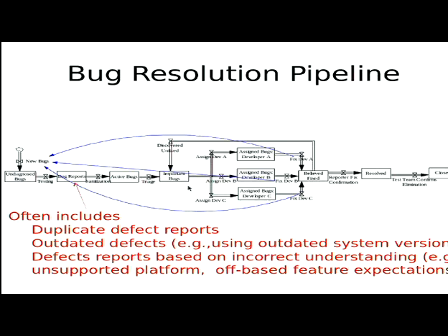So this triage process, which often involves discovering how many actually are in this active bugs area, and then going through and rating them according to standards we'll be talking about in a bit, is a key process. So once you triage it, you decide, okay, these are bugs that are worth fixing. They're kind of important bugs we're going to focus on. And then you assign them to various devs. And the devs, hopefully, through the fullness of time, will try to fix these defects. And they'll be checking them in and reporting them as fixed at some point.